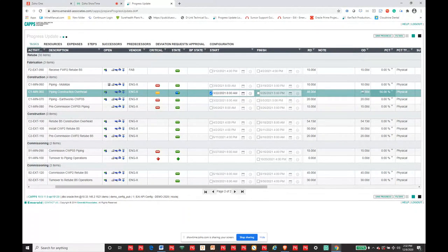Physical means you need to give it percent complete and remaining duration. So in that case, here's my original duration. And for remaining duration, if I'm 50% complete, I need to tell it what the remaining duration is. One thing you'll notice is this number changes when I go to update it, because it's equating back to the 8-hour day that this schedule is built on. Because it's physical, these two don't have to be exactly in line. They need to be what the reality of the job is. So 190 and 23.75 days, that type of scenario. So I can update that piece separately.